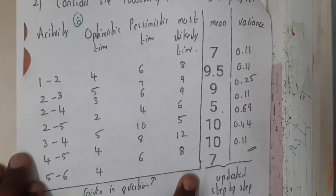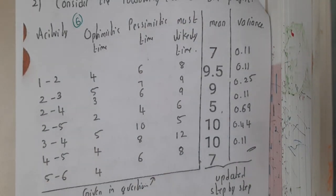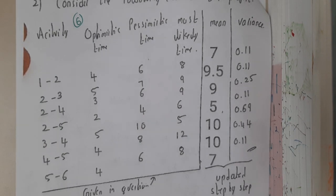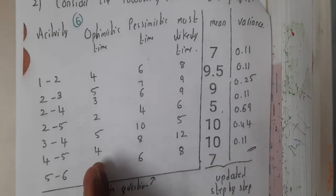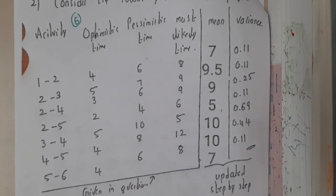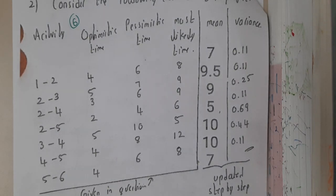That is the reason why please remember the formulas instead of remembering any kind of shortcut. The formula is optimistic time plus pessimistic time plus 4 into most likely time. Remember that most likely time should be multiplied with 4, that's the major thing, and whole divided by 6.